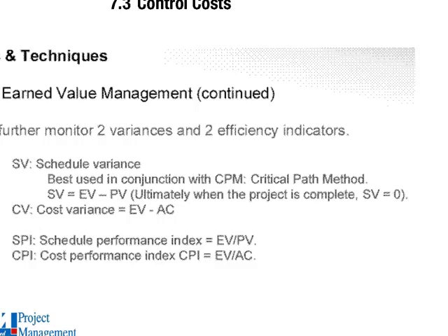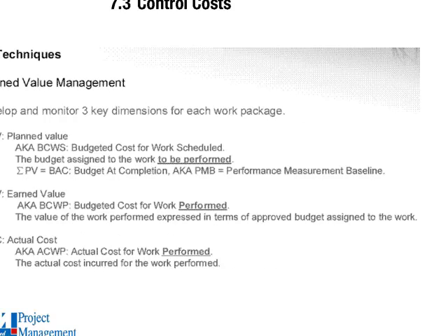Okay, so just now you answered cost variance, right? So the difference between your earned value and the actual cost gives you your cost variance. The difference of your earned value versus your planned value gives you the schedule variance. But when you talk schedule, let's go back. We have to think about time. But the difference between earned value and the planned value is like $1 a month. It will give you a time.